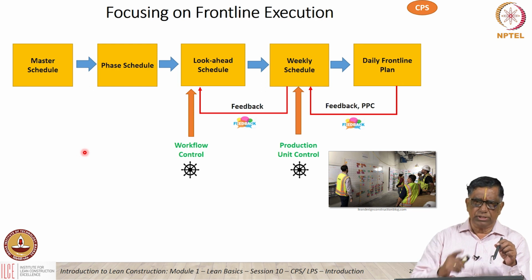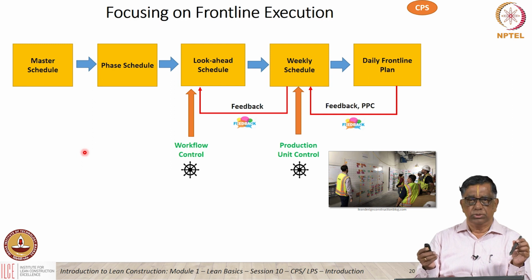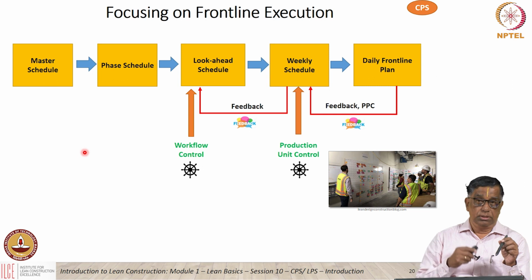If you look at the conventional way of working with a large critical path network, MS Project or Primavera or whatever it is, it's all made well in advance of the work actually being done. You have too many activities spanning across too large a time. So you're not able to have good control and you don't know exactly what is going to happen downstream.